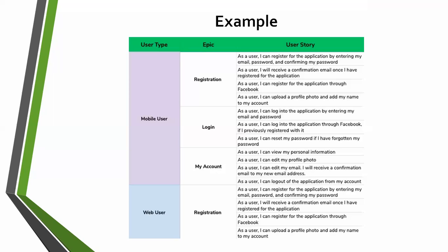Okay. Got my point? Are you sure? Yeah, I got it. Ravi, I don't mind telling you hundreds of thousands of times. The only thing is that sometimes there could be some conflict. For example, if I've created 5 user stories, the developer can ask why you created 5 different user stories. In that case, in the sprint planning meeting itself, we can close any unwanted user story, right? Exactly. That's the reason we have a sprint planning meeting.